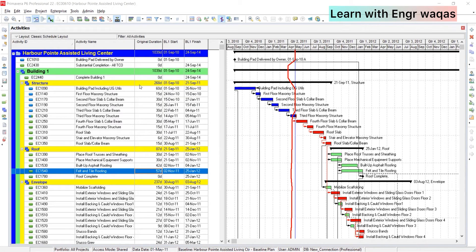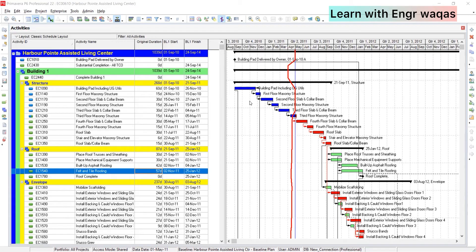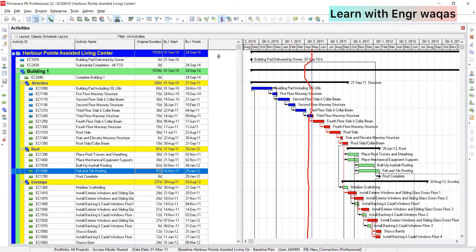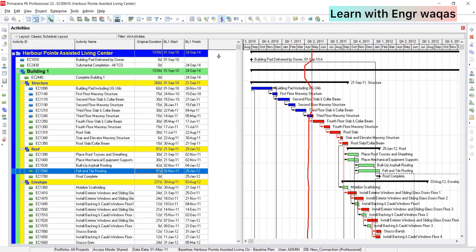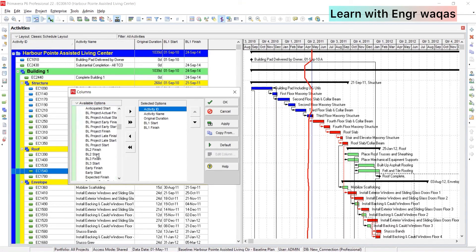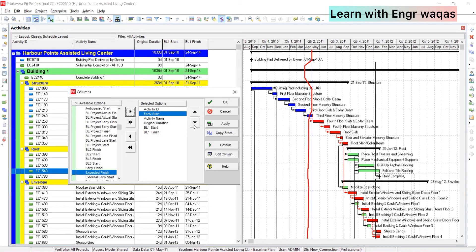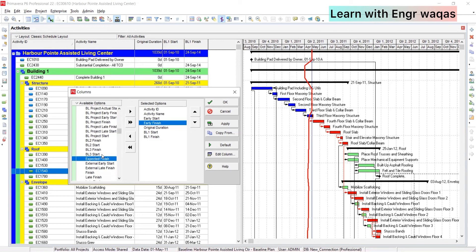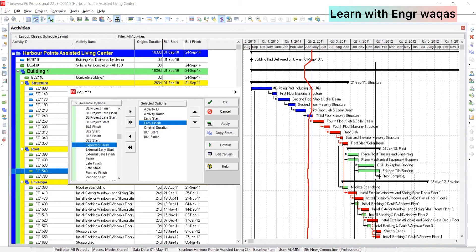The first thing you can add few more columns to optimize your layout to have view of your project critical path method important factors like early start, early finish, late start, late finish. So how can we do that? So here is column option. So I will just click on this button, a new window, and here we have you can see dates oriented things. So we have early start, I will just move it to the right side.